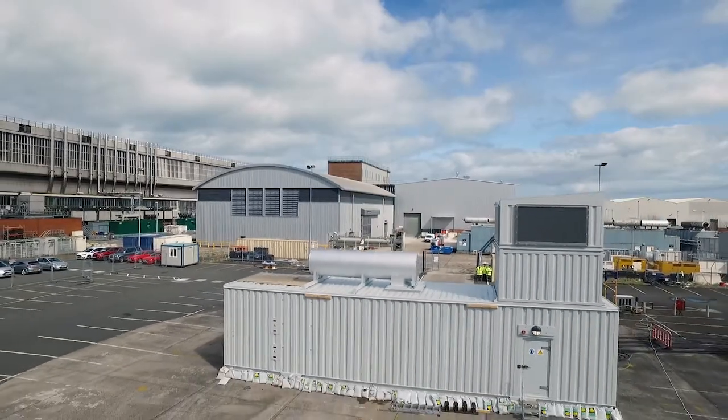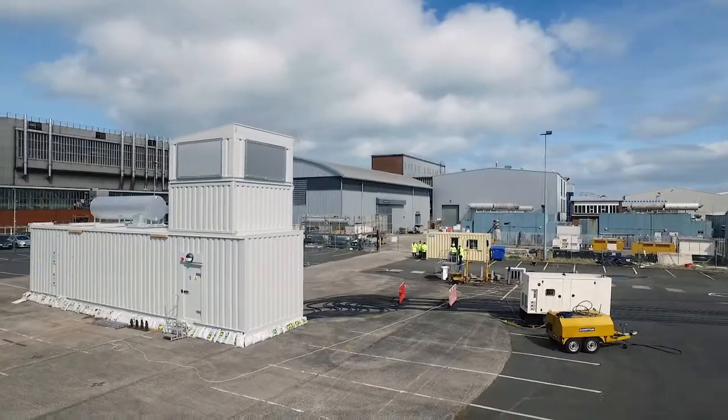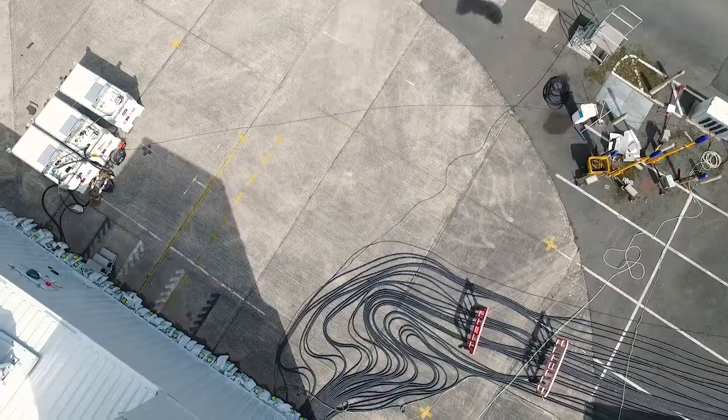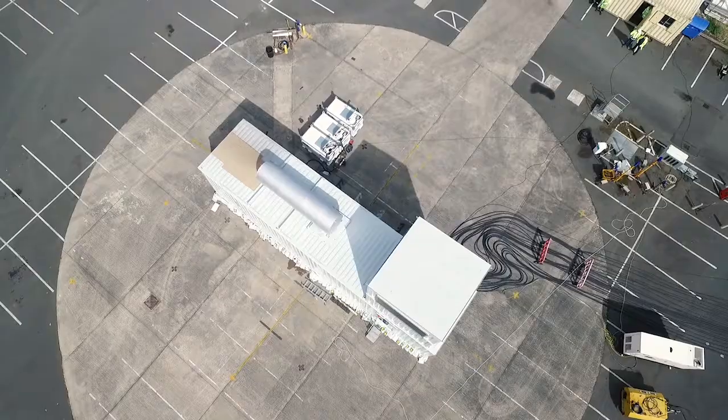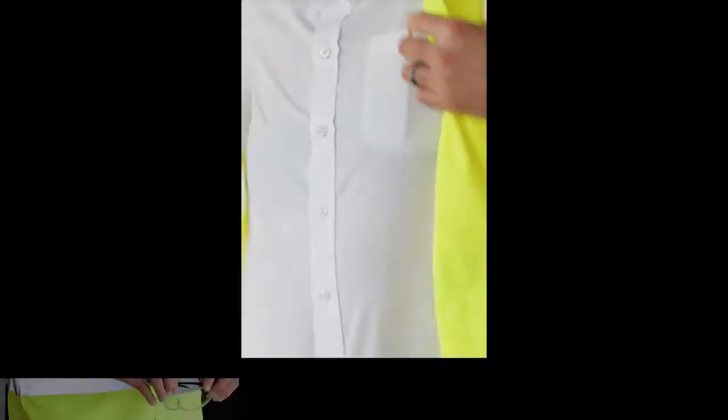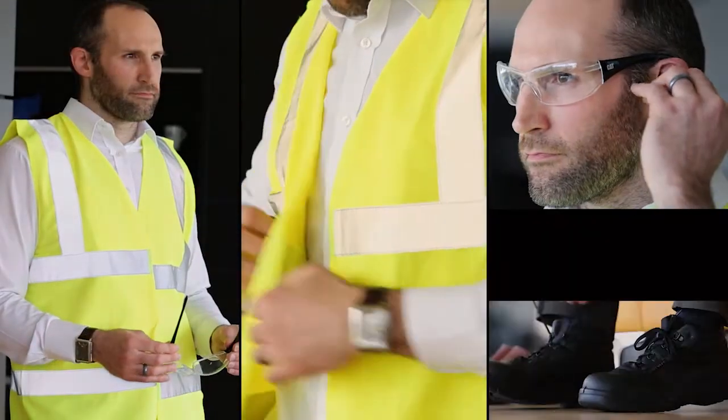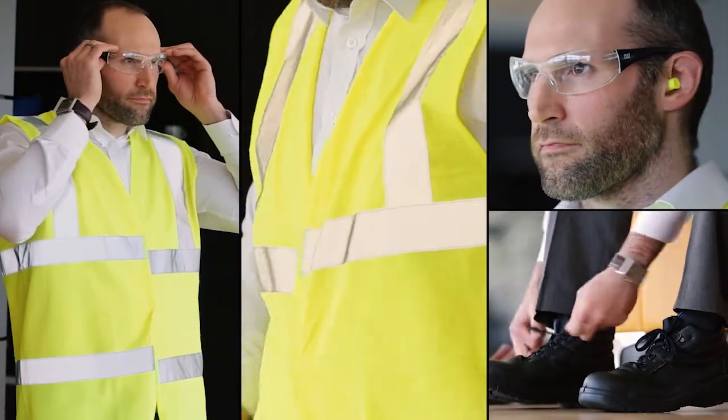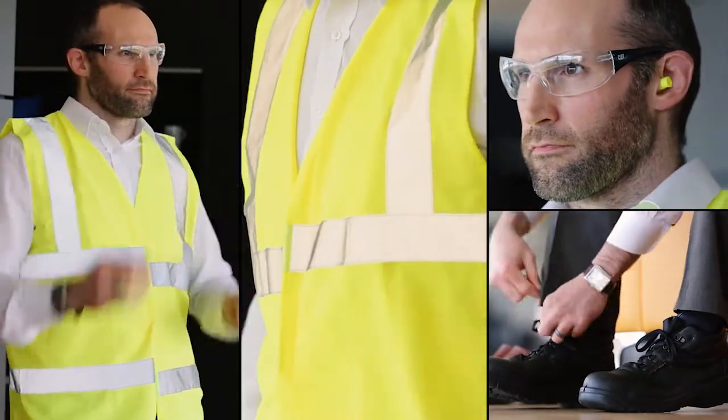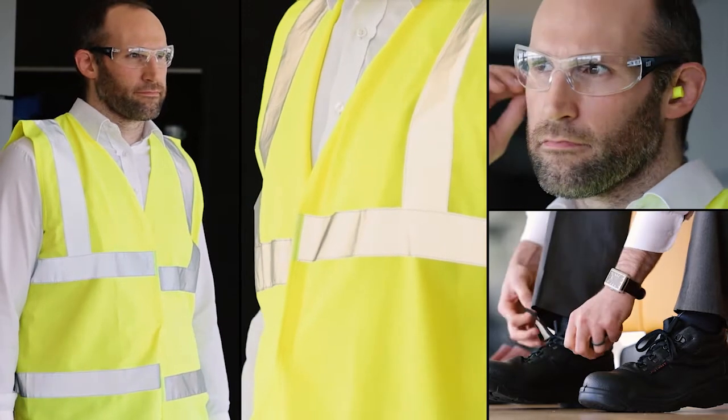For added peace of mind, we offer you the opportunity to see your power solution in test. Carried out at our specialist testing facilities and coordinated by your project manager, Factory Acceptance Testing allows you to visually inspect and experience the full functionality of your product.